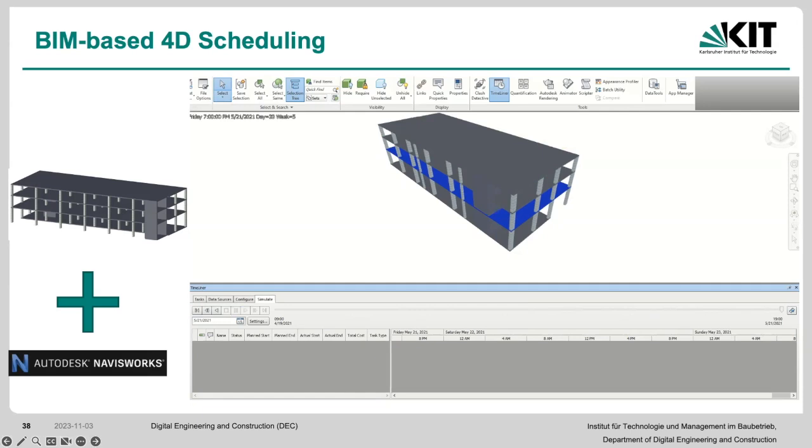We want to have this in more of a two-way communication manner. We can identify whether some element is not on schedule. For instance, one way is through point clouds and comparing these together. And that is also not a done deal in terms of its scientific parts. However, we also are not utilizing that information to its fullest potential. Let's say we know this information. We know the earned value analysis in terms of project control. What is going to happen? What would be the best course of action to meet the project credentials?